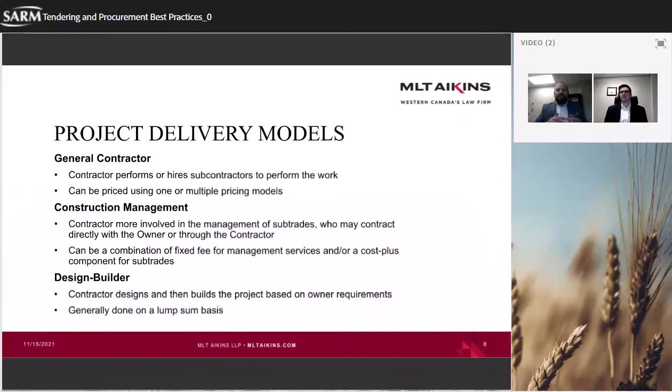And this is where we're starting to see the blurring of the lines of the construction manager and general contractor, where nowadays under that CCDC 5B contract, we're seeing many of the construction managers self-performing some scopes of work, whether it be work that'd be traditionally done by a sub-trade in a competitive tendering environment, or just doing what we call CM support work, where they're providing general laboring, general carpentry to kind of fill the gaps between traditional scopes of work.